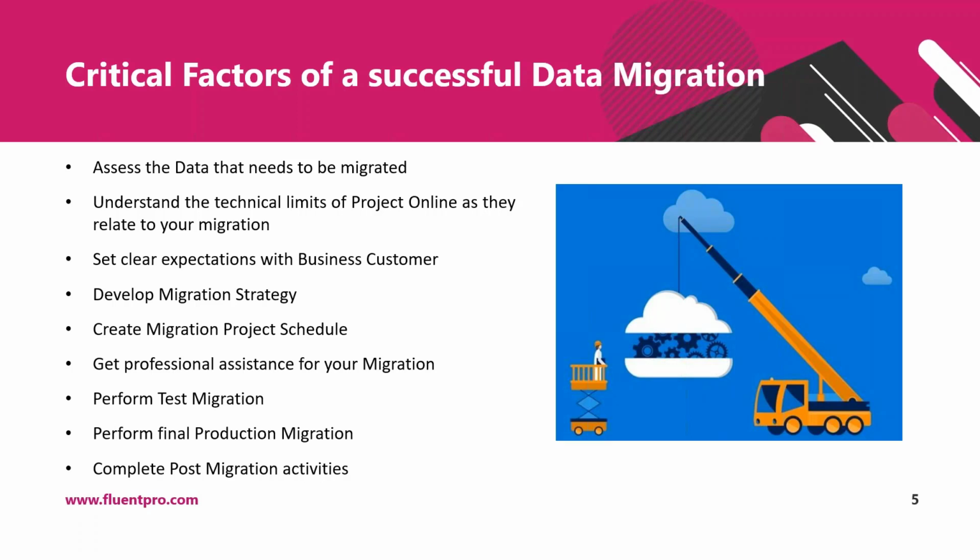Create a draft plan first, listing all necessary migration activities. Before a test migration is completed, this plan will contain estimated durations and efforts. Once test migration is completed, the plan can be adjusted based on the empirical knowledge about the environment, migration speed, and specific issues of the data.